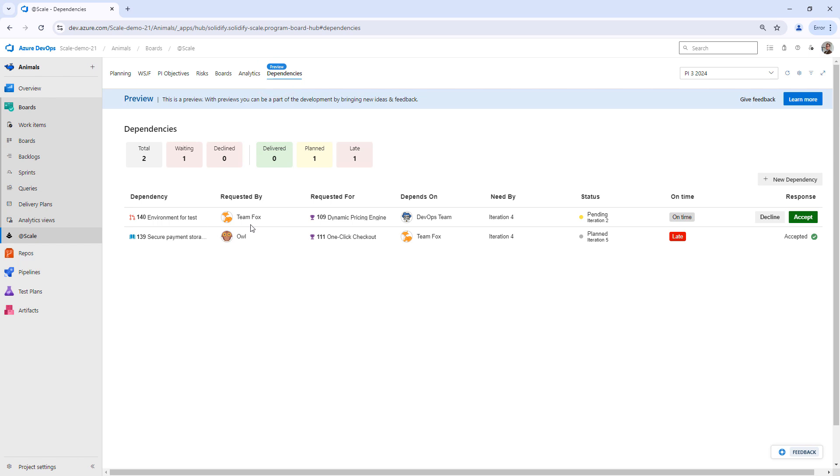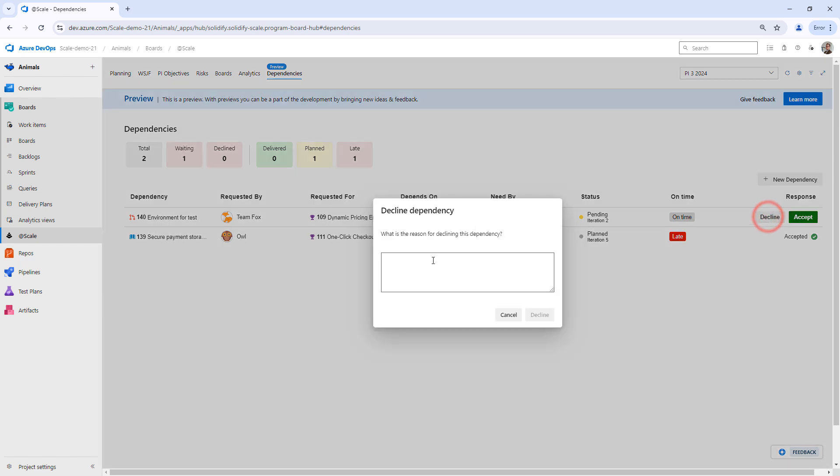In this case, the DevOps team, they're going to decline this dependency. They're going to say that they can't commit. They have too many dependencies this PI and they want to focus for this for the next one.